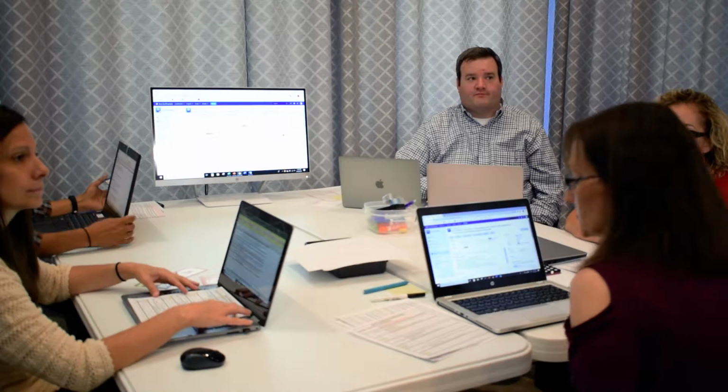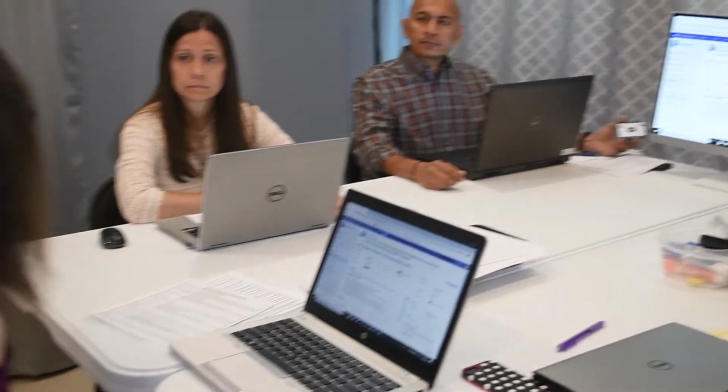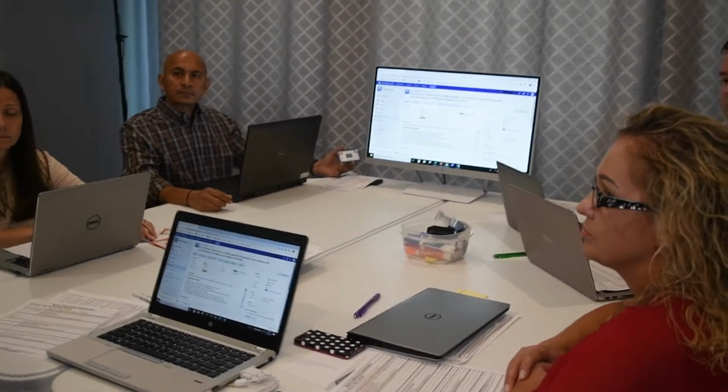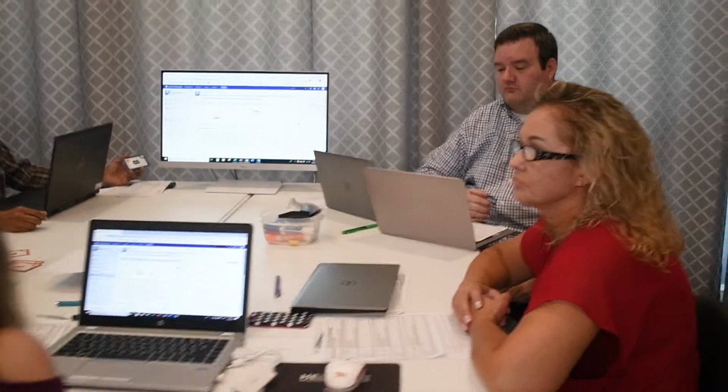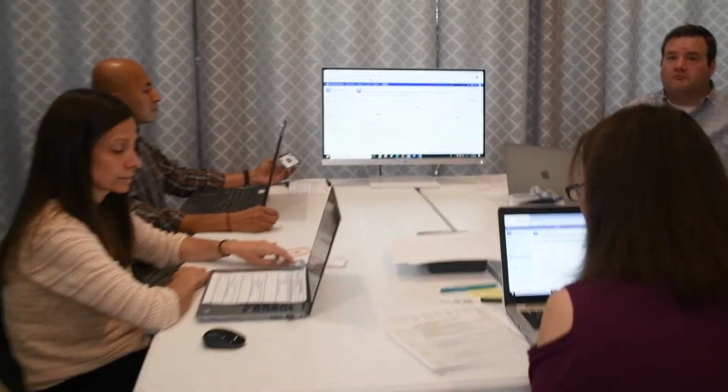Okay, you guys, let's go through some stories today. The training page that we're going to work on is the biggest page that we have. But keep in mind when we're pointing the stories this time that a lot of the stuff's repeat. So, for instance, if we have 8 points on a story, we may want to go to 5 points because you guys have done a lot and you're going to be copying a lot of code.